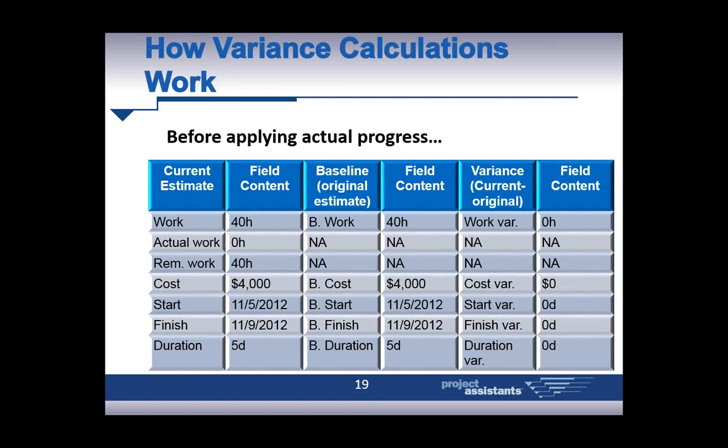Yes, we see project managers not responsible for budget fairly commonly in cost center project management, which would be something like IT, where our resources are a sunk cost, so we're not necessarily tracking their costs. There's an average departmental rate of $80 an hour, or whatever the number is, and so if you tell me what the labor is, I already know what the cost is, frankly. So I would say absolutely yes, and one of the things Jim showed was applying a table. There's actually a table called the baseline table, and what you would see is your work field would be filled in, your start, finish and duration fields would be filled in, and your cost field would be at zero. So it's a very fair thing to do if that's what the organization wants.